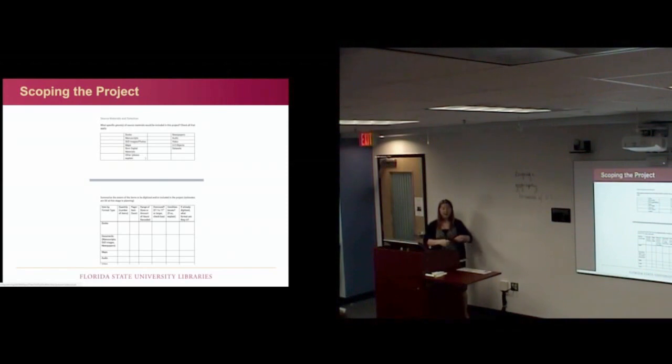We very purposefully hand this off to whoever wants to propose a project without much information, because it's really important to get an idea of how your stakeholder is thinking about the project before you start to think about how you'd actually do the project. So we give this to whoever wants to bring us a project. They fill it out. It helps them think through all the different pieces of the project. What kind of material, what kind of metadata, what do we want to build at the end, where's all this stuff going to live, who's going to take care of it for the next 50 years. Just gets people thinking about things they might not normally think about when they have that grand idea to start a digital project. So they fill this out and they hand it back into us in the DLC,